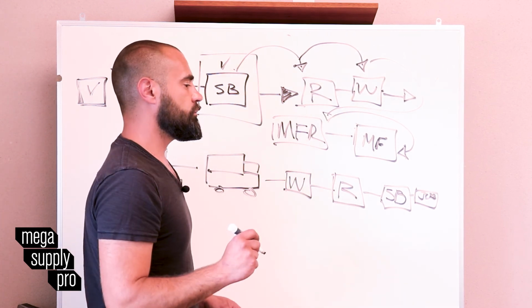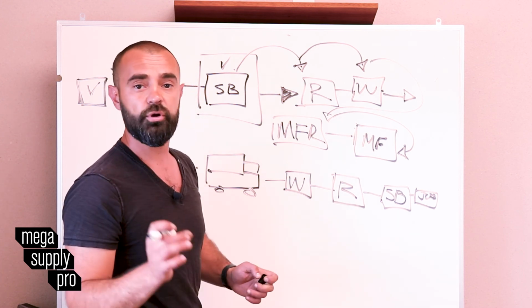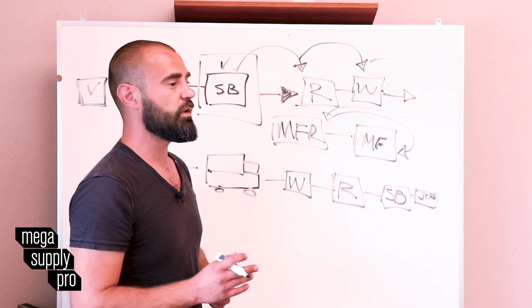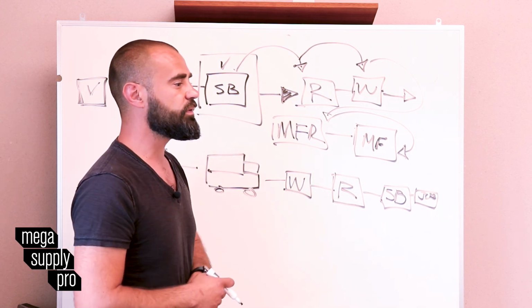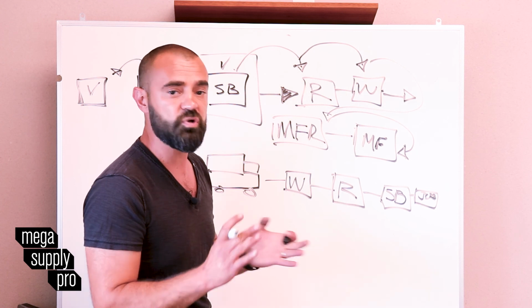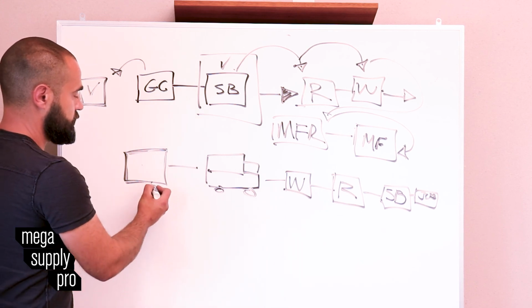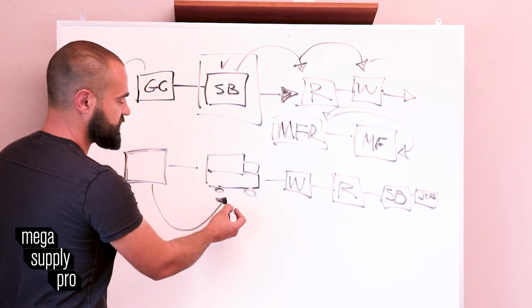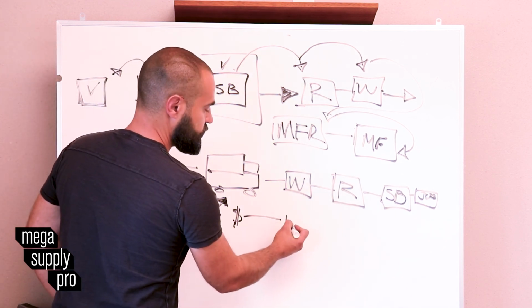If you have, let's say, a 28 unit building or a 30 unit building, I'm sure you're all aware of such thing as full freight allowed. Manufacturers allow you, you have to reach a certain dollar amount to get free shipping. All right. If you get a 28 unit building and you have, let's say, 60 faucets on a pallet, most likely that will not be reached. So that means that manufacturer will be charged, if they don't have their own trucks, by the trucking company shipping fees, okay, to get to the wholesaler.